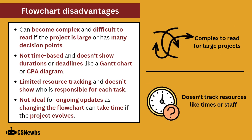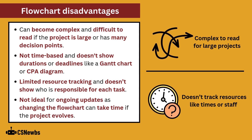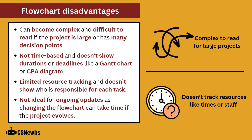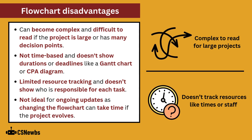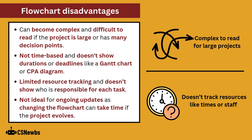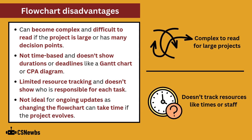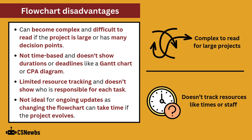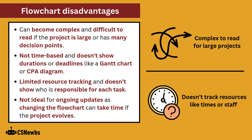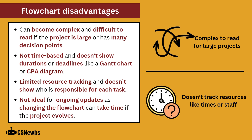However, flowcharts can become complex and difficult to read if a project is large or has many decision points. They're not time-based and don't show durations or deadlines like a Gantt chart or critical path analysis diagram. They have limited resource tracking and don't show who is responsible for each task. They're also not ideal for ongoing updates, as changing the flowchart can take time if a project evolves.